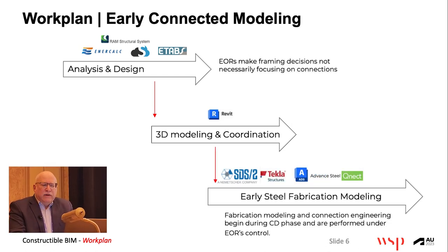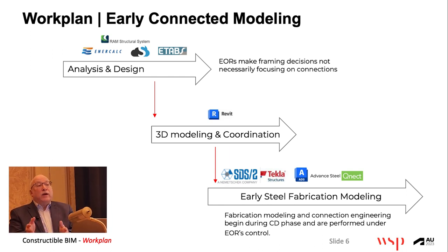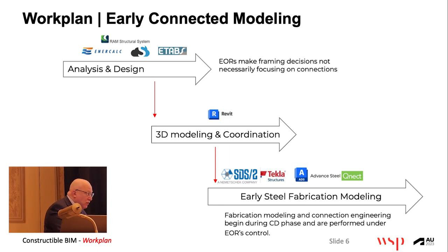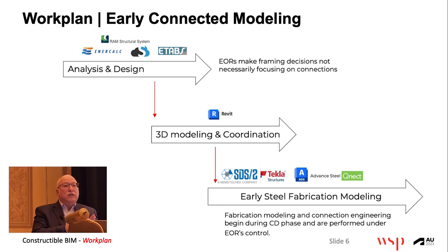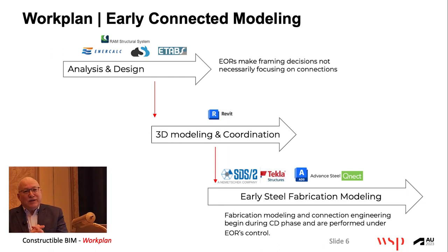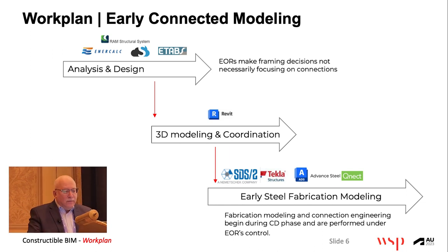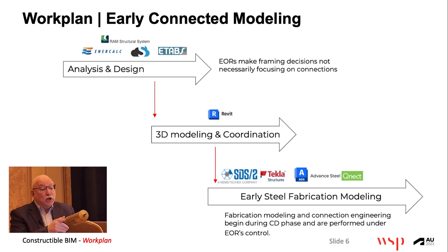So what are we doing different here? Well, we're taking this third step and we're gonna start earlier. It's nothing more than that. Now, if you're starting it earlier, that there's no fabricator on board, well, someone's gotta start the connection design process. Someone's gotta start the modeling in the software that fabricators want to see, SDS2, Tekla, whatever. All of that starts to happen earlier.